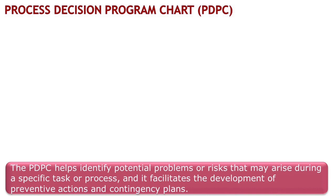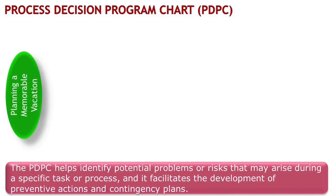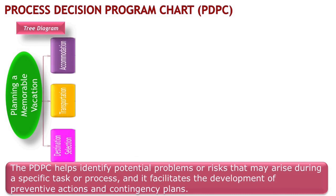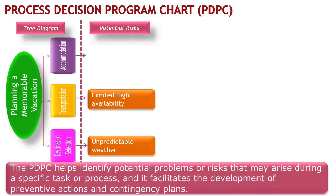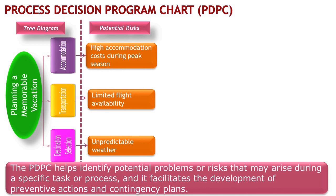The Process Decision Program Chart, or PDPC, is a valuable tool for identifying potential problems or risks in a specific task or process. It helps us develop preventive actions and contingency plans to mitigate these risks. Using our vacation planning example from the tree diagram, we apply the PDPC to identify potential risks for each category. Under destination selection, we identified the risk of unpredictable weather. Under transportation, the risk is limited flight availability. Under accommodation, the risk is high accommodation costs during peak season.